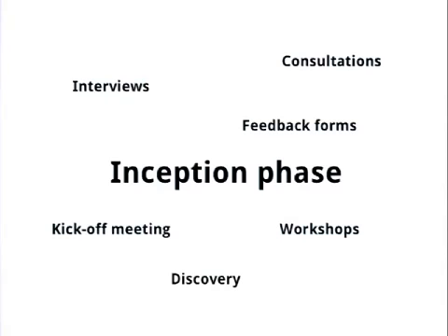And the other things are just workshops. If they don't want to get you in a room with their staff, send out a feedback form and get some highlights about what they're expecting, consultations. And use that vision that you've established to get an idea of how the work is going to be shaped. So if it's a project that's really strictly about the front end, they don't like the way the site looks, they want to improve the end user functionality, that's fine. But if you find out through your consultations that actually the CMS editors hate the current CMS, then that's going to really have to shape the rest of the project, and they might not have mentioned that actually.